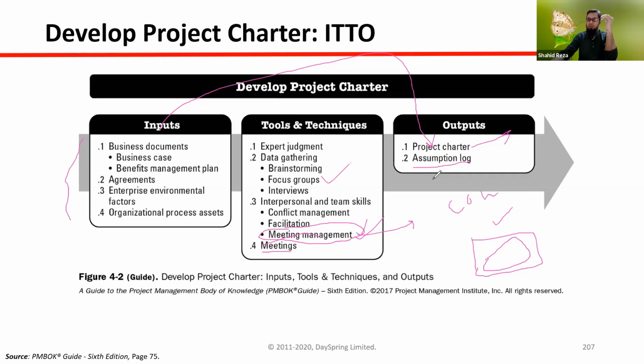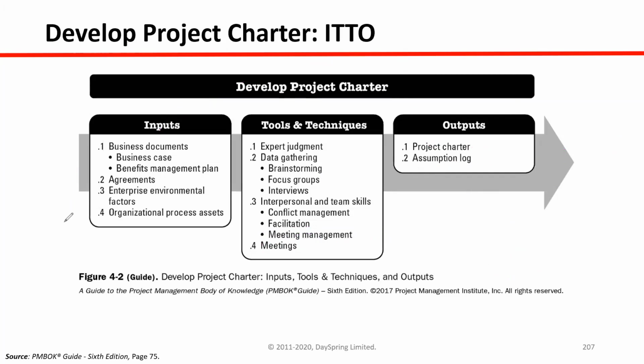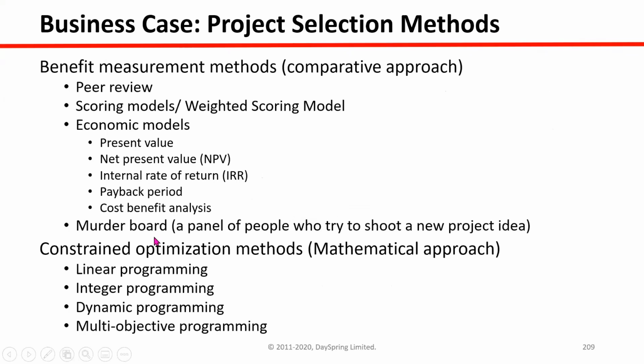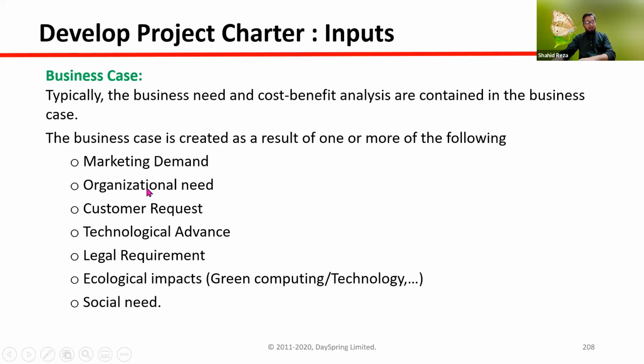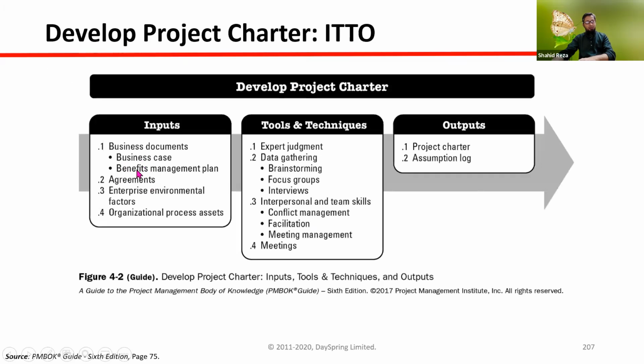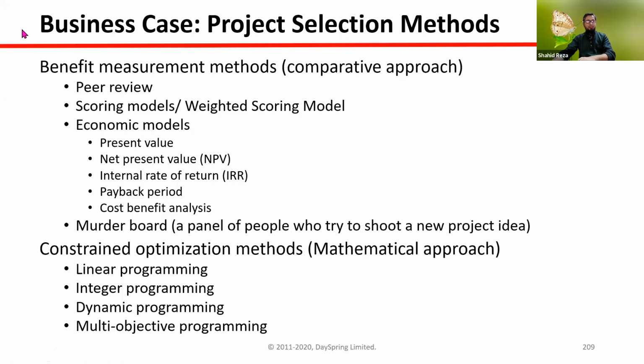So these things are assumptions. All assumptions you have to write in the assumption log. That is another document, right? This is another document. So the assumptions you are thinking will be true throughout the life cycle of the project, you can write down all in this document. I have actually discussed all the points in detail here. But when I go to the next slides, you will see discussion of everything that I discussed already.